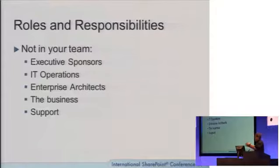So then looking a bit wider out of your immediate development team, there's also almost certainly the need for a project board that's going to drive the overall strategy behind your deployment. You're going to need an executive sponsor. Without an executive sponsor, you're very unlikely to get the budgets that you need to deliver. You're not going to be able to effect the change through the business that you're probably going to need in order to deploy your intranet or your application, whatever you're building.